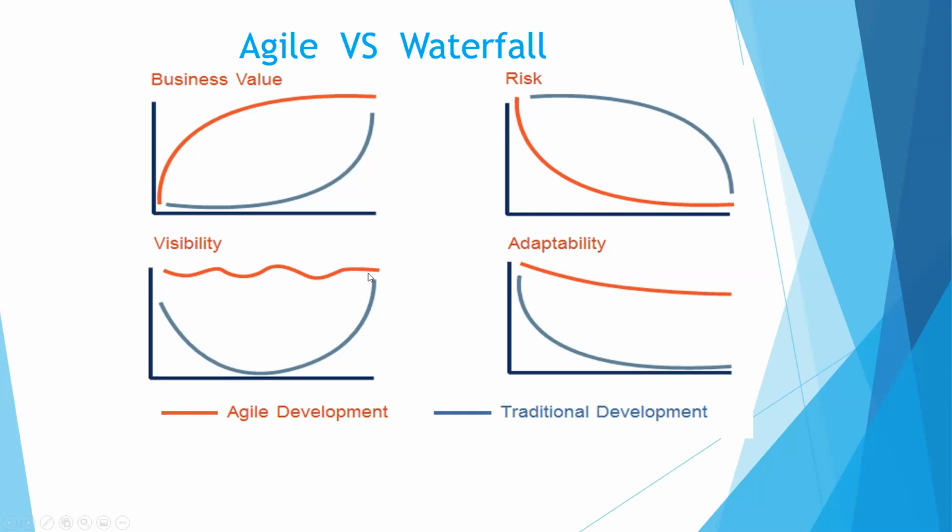Well, in an agile team, you can't hide. All your metrics are displayed. They are accessible to all the internal and external stakeholders. You know your velocity, for every sprint. If you say I'm going to deliver maybe 20 story points, and you are delivering it, it's going to show on your agile board that consistently you've been delivering your 20. If you are delivering above that, then everybody will know that maybe you have capacity. If you are delivering below that,